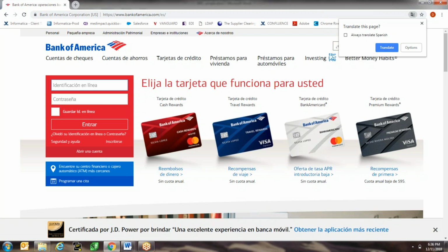You are making an assumption that whoever is using this website will have at least an internet speed of 50 kbps. You know what? That's not an assumption. That's a dependency. This website, the successful working of this website is dependent on whether the bare minimum internet speed of 50 kbps is available or not. If the internet speed goes below 50 kbps, this website will crash. It will not work.